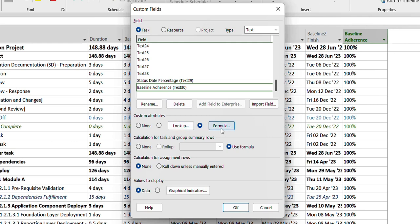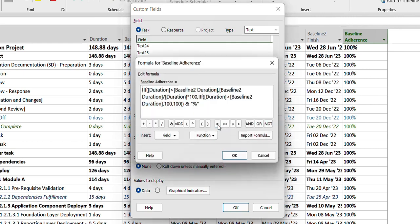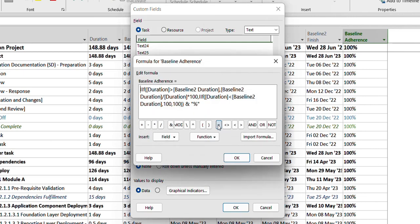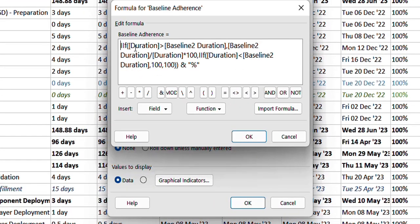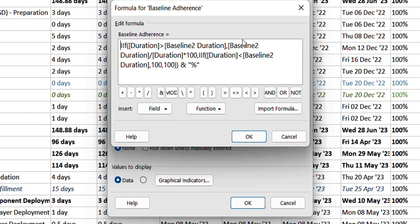I selected formula from the custom attributes. After opening the formula, I put in this formula. What it's doing is it's putting a check that if a duration or the actual current duration is greater than baseline duration, then what it will do is it will find out what was the percentage of that difference.